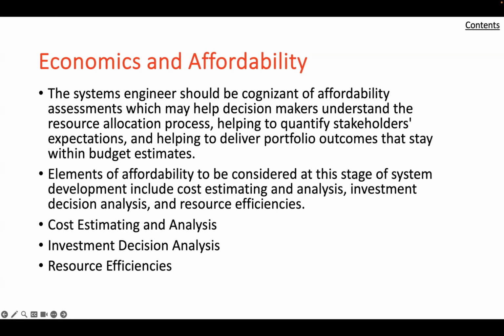The operations and support costs include operating and supporting the system during employment, to include personnel, maintenance, and sustaining investments. Generally, this is the largest portion of the cost of the LCCE. Finally, the disposal costs include demilitarization, detoxification, long-term waste storage, and any environmental restoration efforts that are required.